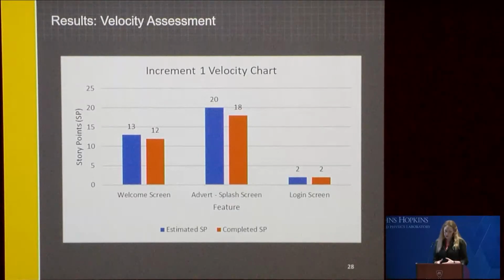Since Scrum encourages updating the backlog after each increment, resulting in an update to the number of estimated story points for each feature, it's necessary to re-baseline after each increment. This results in recalculating the EVM values based on the updated estimates and actual data, validating the modified backlog against the release plan. Therefore, changes that affect cost and schedule for release completion can be evaluated early and often.